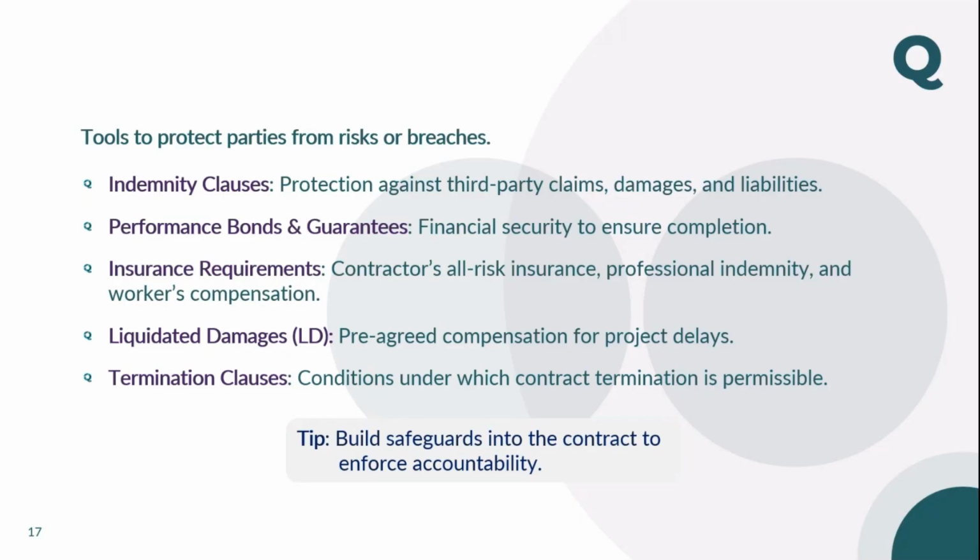So the subcontract is a contract between the main contractor and the subcontractor. Even though he is working for the client, the client cannot sue him because of privity of contract. Privity of contract is a principle that protects a contract from interference by a third party. To overcome this, because the employer is the one who pays the money but still cannot get involved in the